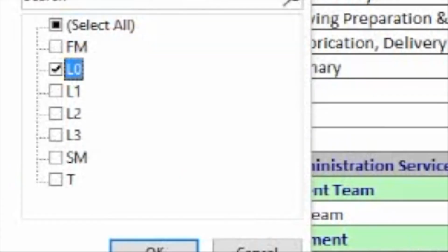With using this standard Excel functionality, you can filter out only some part of the listed activities. If you filter out only L at the level column, at the most left column, you can see the summary schedule. You can use all other Excel functionalities with the imported data.